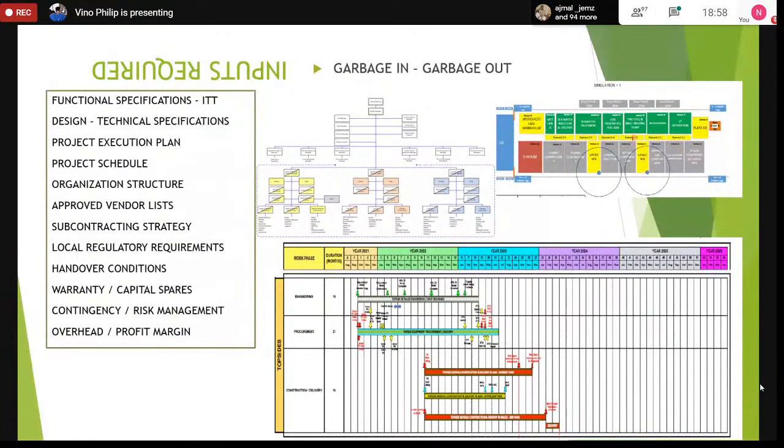So we can make the pipe rack and the flare knockout drum and the workshop and lab and the laydown areas and the deck crane. So these circles are a representation of the deck cranes. So we can install all of that at the shipyard, conversion and repair shipyard, while the hull is being modified for receiving the new topside.